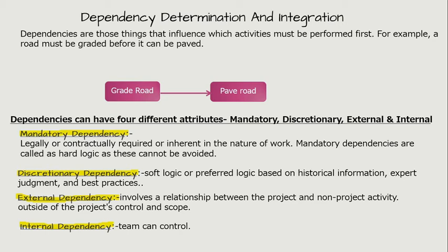In the above example, paving of the road is dependent upon grading it. So, grading is a mandatory activity. Mandatory dependencies are called hard logic, as these cannot be avoided.